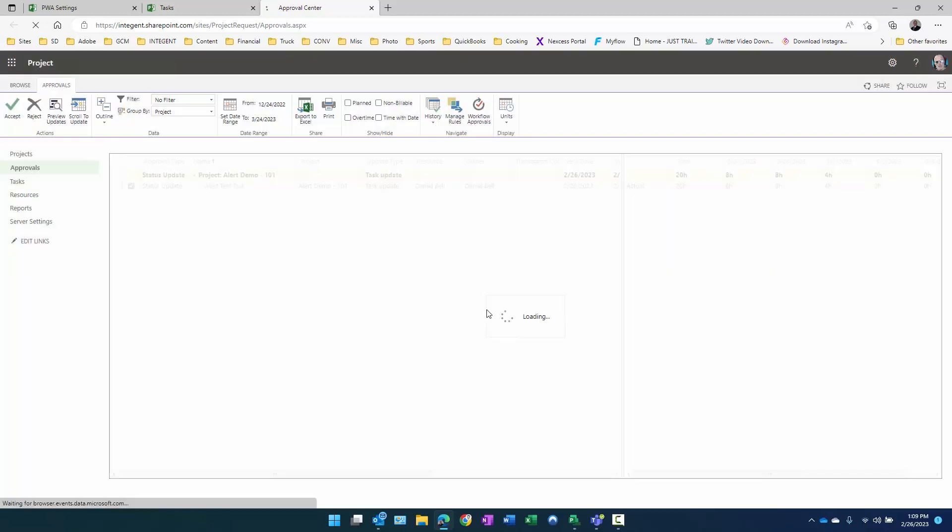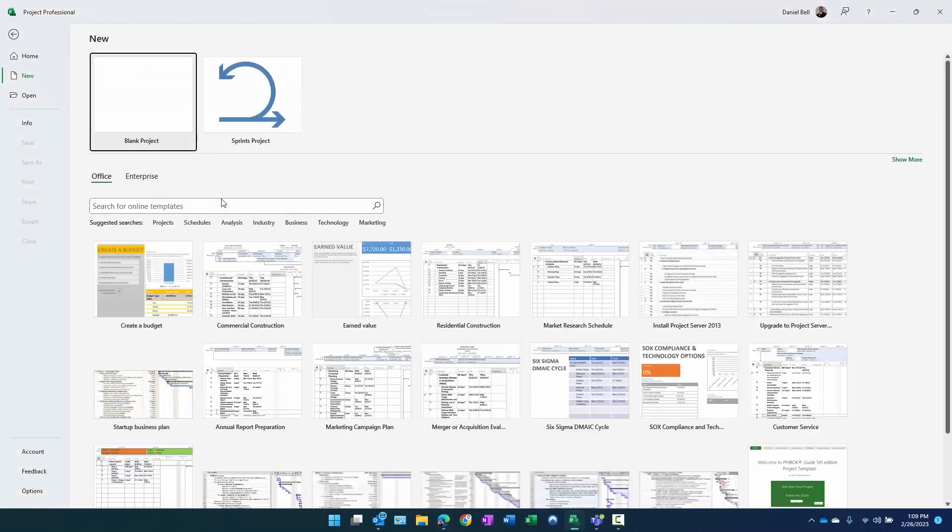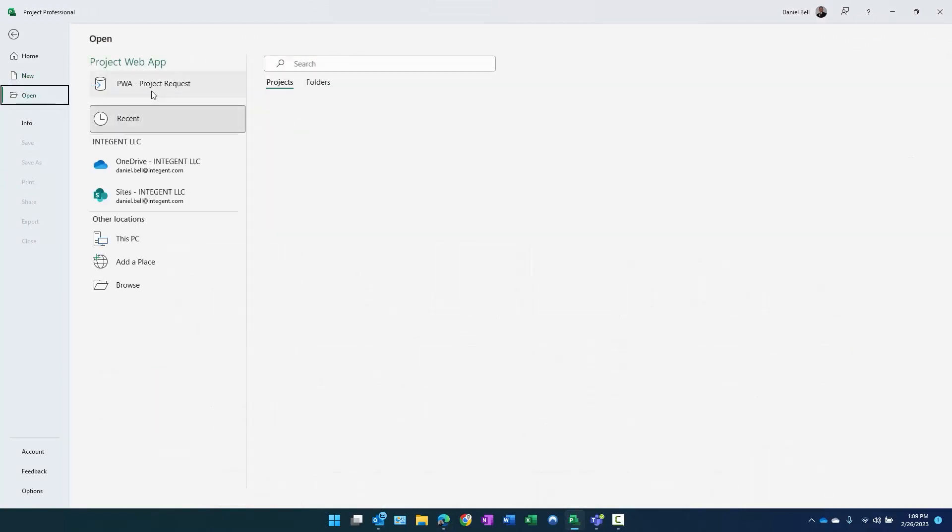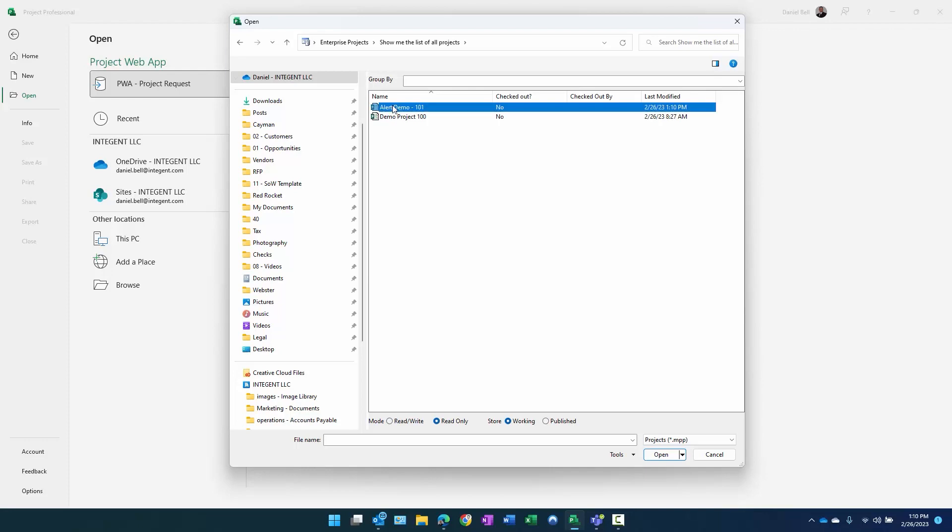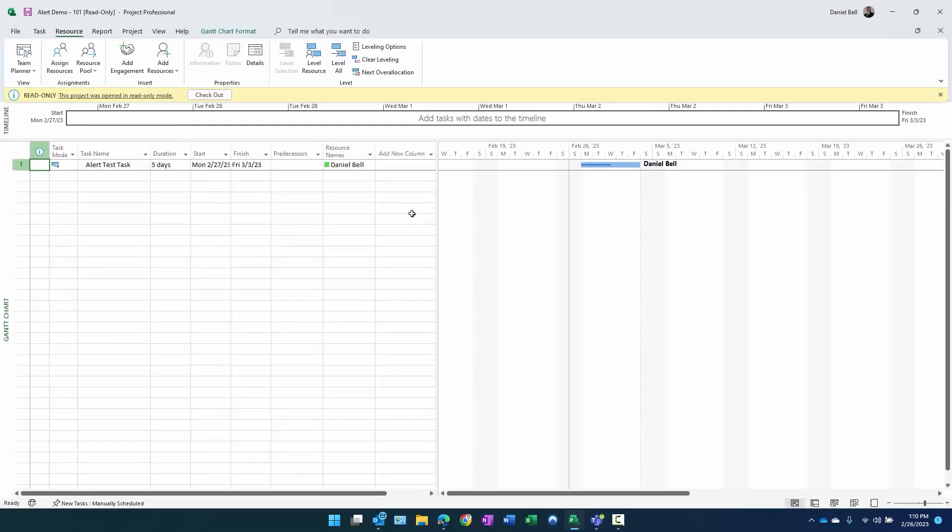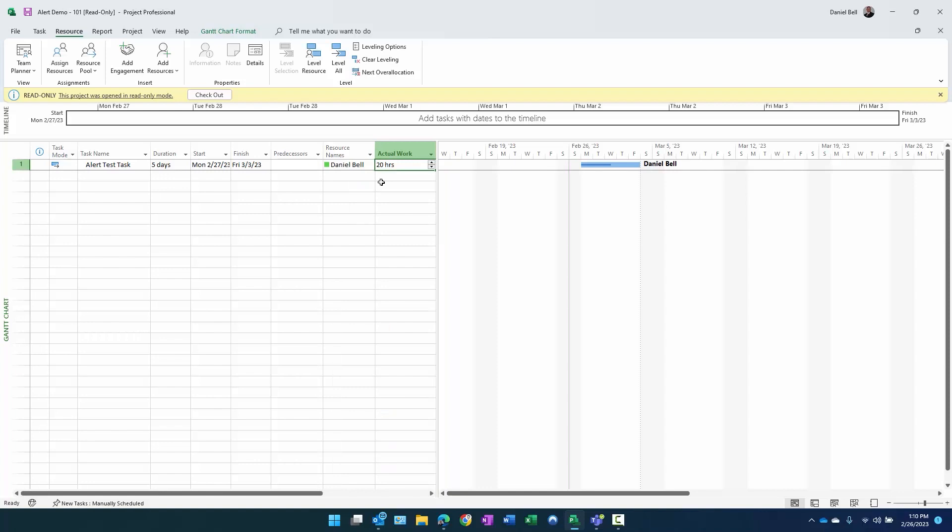Now there's processing going on behind the scenes. If I was to reopen this project at this point in time, I will click here and there's my alert demo 101. Open the project up. Now you can see in the Gantt, there's a solid bar in the middle of the larger blue bar that represents the progress done on the project so far. If we want to look at the actual progress here, we can put actual work there. There's the 20 hours, and there basically is setting up notifications in Project Web App.